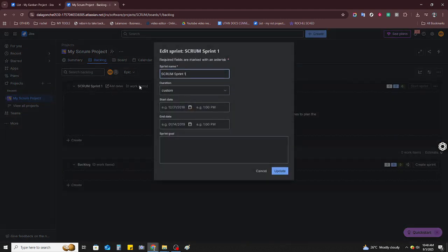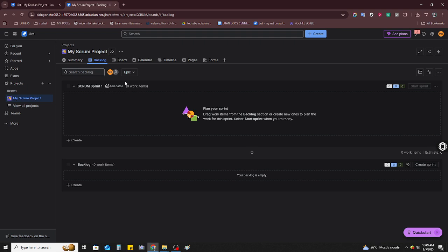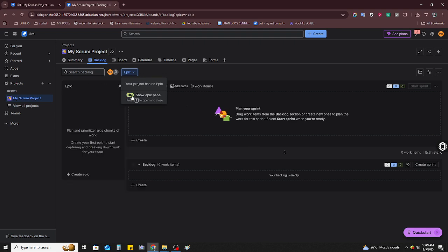Once you've successfully spotted the field, it's time to add or edit the story points. A simple click on the story points field will allow you to input a numeric value. This number should represent the estimated effort required for that particular issue. Typically, many teams use values following the Fibonacci sequence, like 1, 2, 3, 5, 8, 13, and so forth, but your team might have its own set guidelines.